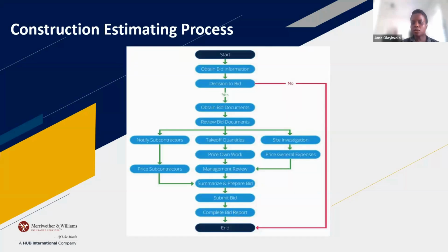It's from Patrick Pickney. Patrick says, how do you negotiate unforeseen conditions that are far beyond expectations? Hi, Patrick, this is a great question. I think first, once you come across an unforeseen condition, the first step would be to investigate the documents you were provided, whether it's your drawings, your geotechnical reports, or the contract you signed with the owner or the GC. Whatever documentation you were provided, you want to go back and review it to make sure that you haven't missed something.